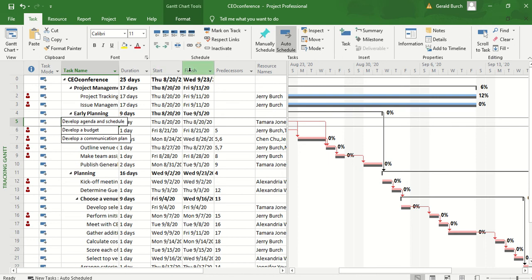When did you start it? When did you finish it? And what percent complete are you? So if you look at page 1 of the task 6 instructions that you have, you've gone through this process with what we call a data call. In your data call, you've reached out to the people and said, hey, where are you? Have you started it? What's going on? And where are you headed? You will see in the middle of the page that you have 4 different projects or tasks for these projects that you have an update on.